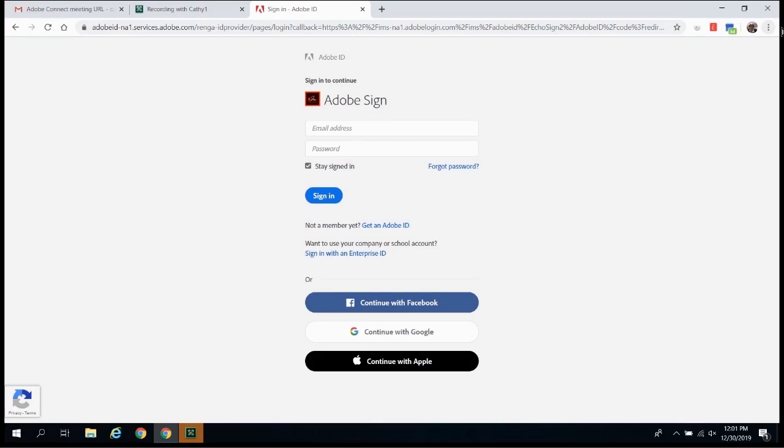So now we're going to talk about sealing record sets. I need to mention a couple of things first. As background, in order to be compliant with PD 21.1, which is requirements for the retention of records, as of January 2020, project records which require signatures shall be electronically signed. So an example of a project record that would require signature would be the change order form that we just demoed earlier.